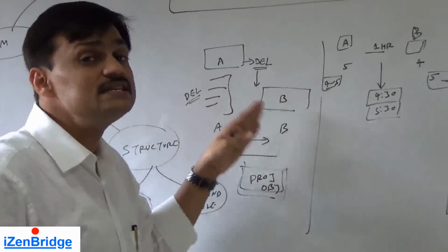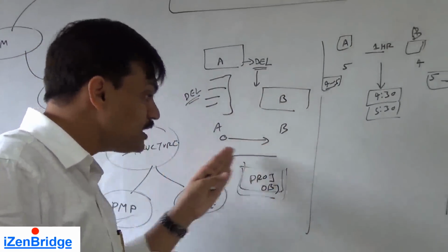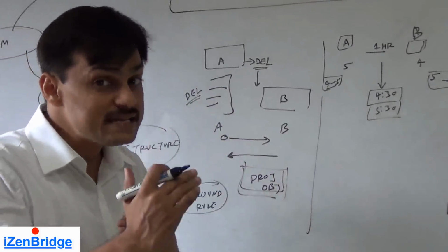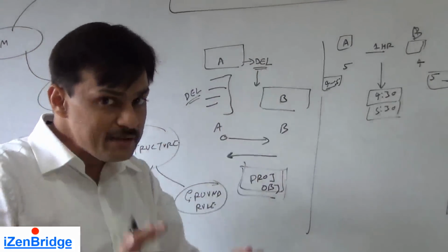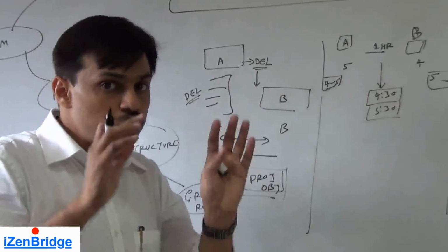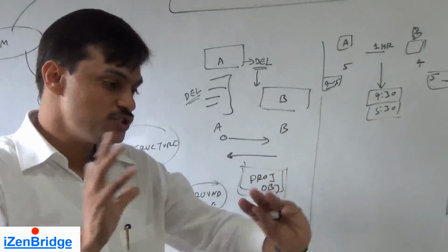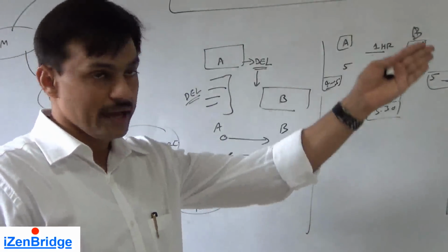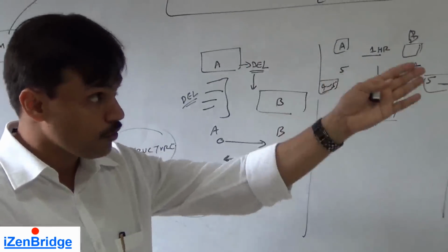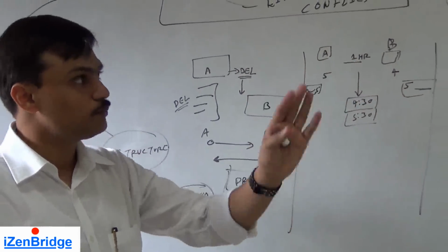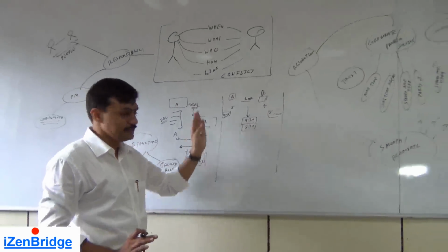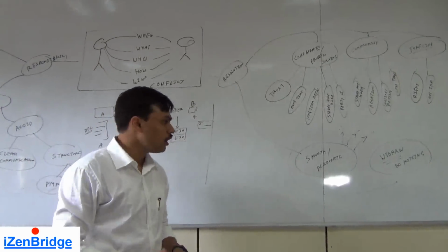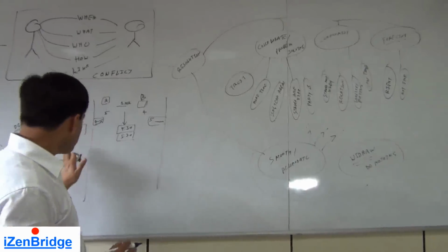If people are not trusting each other, they won't be able to listen to their problems and then find a solution. So smoothing is a temporary technique where we try to bring people to a table, and focus on a common ground which both the teams believe in. And once they reach there, we apply another technique, either collaborate or compromise or force. You can put it as either collaborate or compromise, and then take it further. Withdraw or do nothing. Same thing.